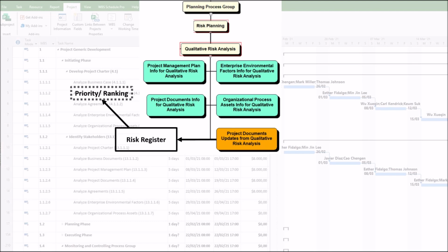First, the first component is priority ranking. It assigns a relative score, such as high, medium or low, or a numerical ranking, to each risk. It is based on focus. Tells the team exactly which risks to spend time and money on. Prevents analysis paralysis on trivial risks.